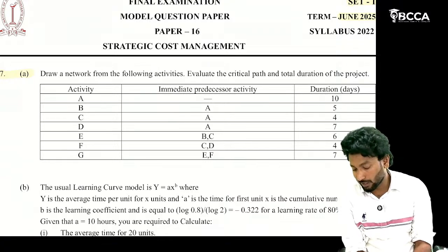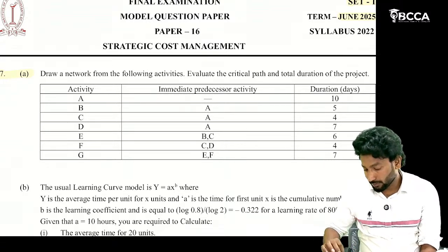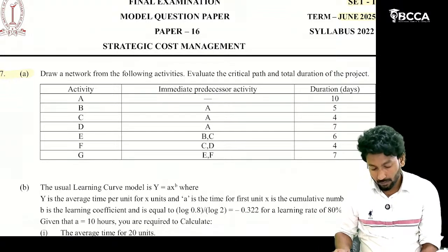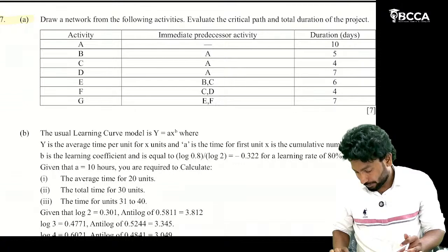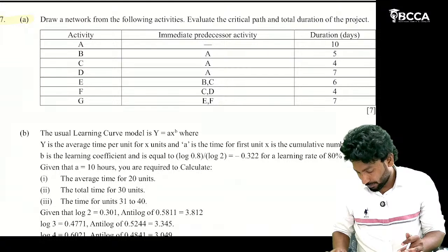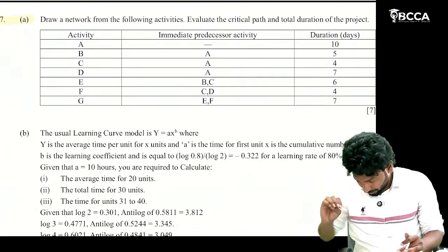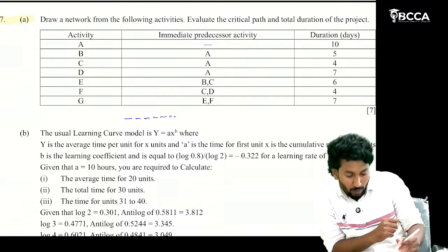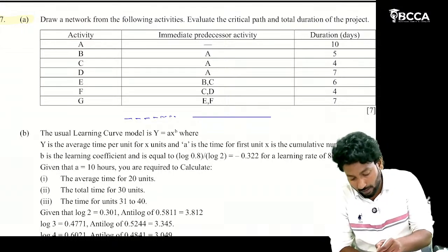You have directly drawn a straight line, so that is wrong. Dummies you should draw as dotted lines only.